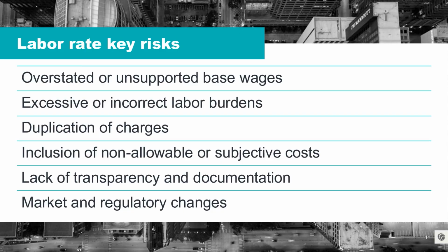Lack of transparency and documentation. Insufficient detail in labor rate calculations can obscure hidden fees, markups, or profit margins, and subsequently, owners are not able to verify the reasonableness of charges, increasing the risk of potential cost overruns and disputes. You can avoid this by setting terms in the contract upfront that require all proper supporting documentation, and then following through on your right to audit and reviewing these rates prior to incorporating them into the contract documents.